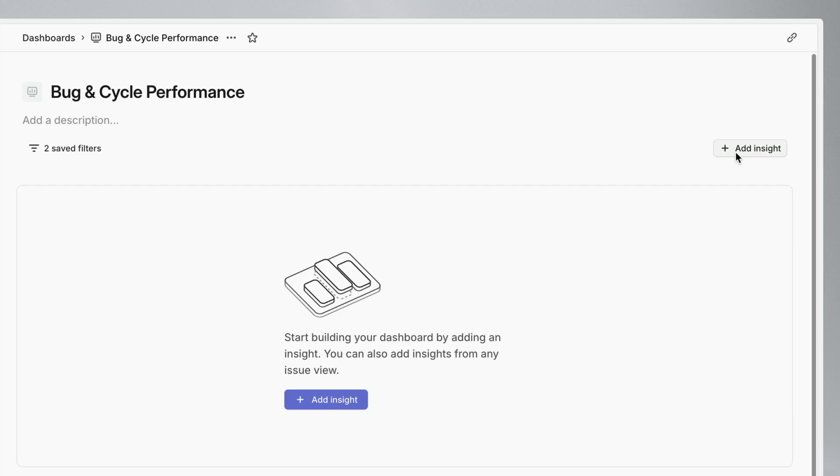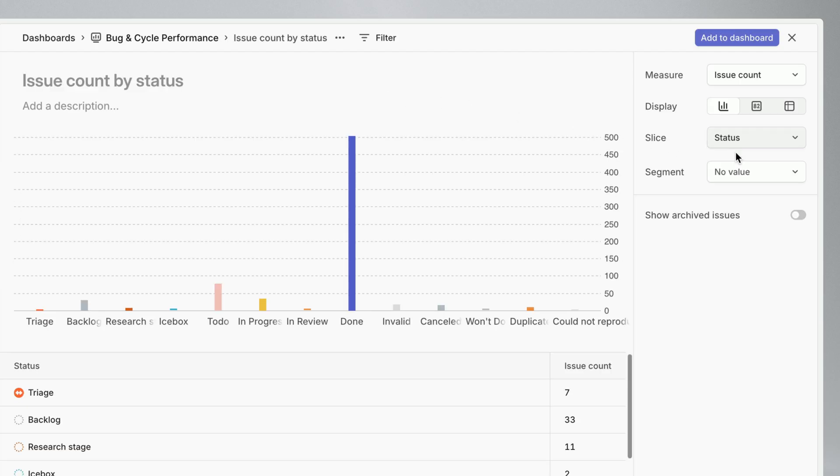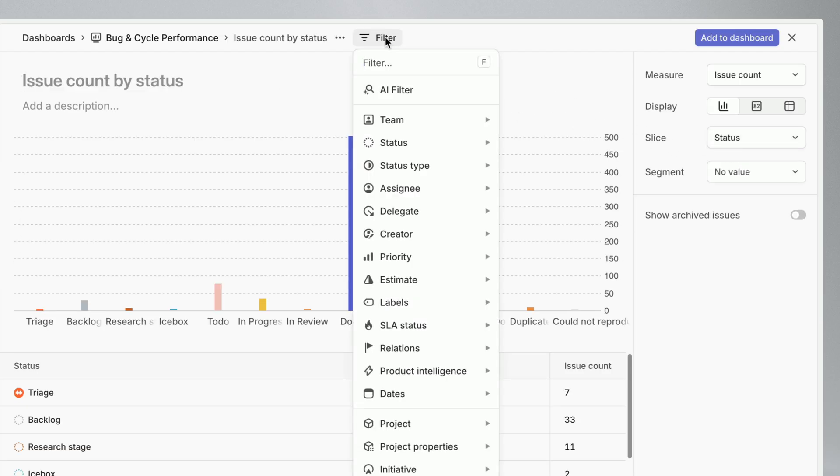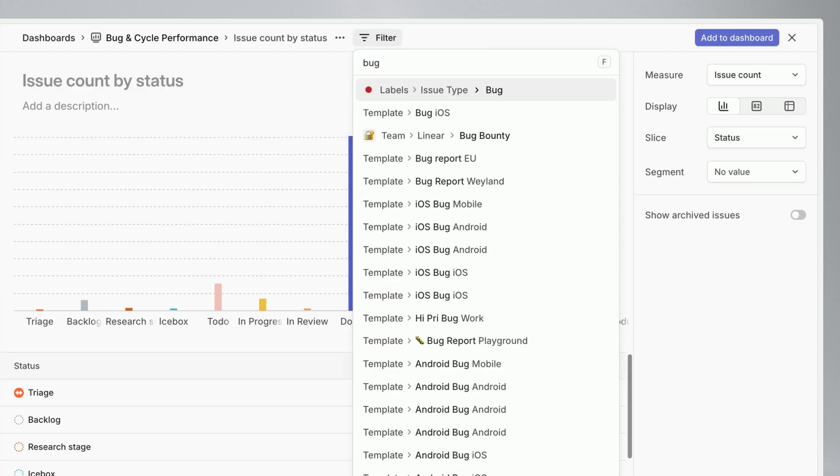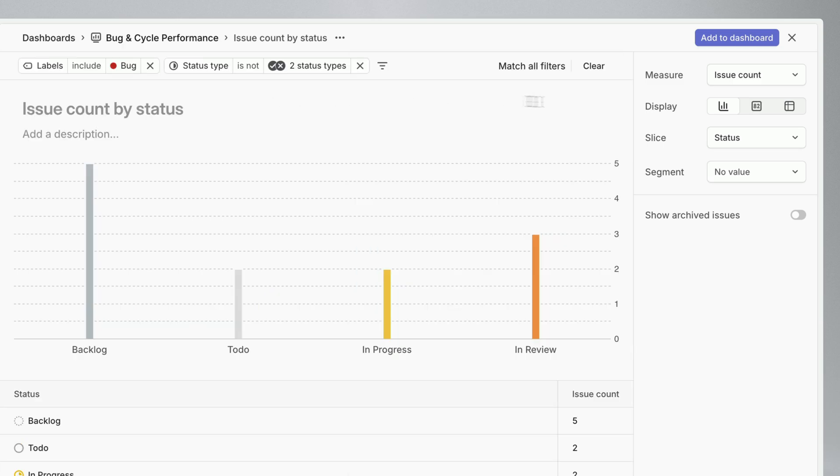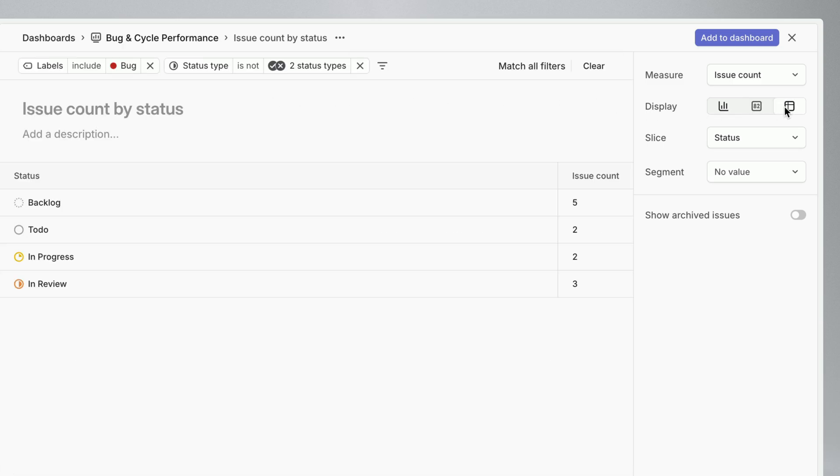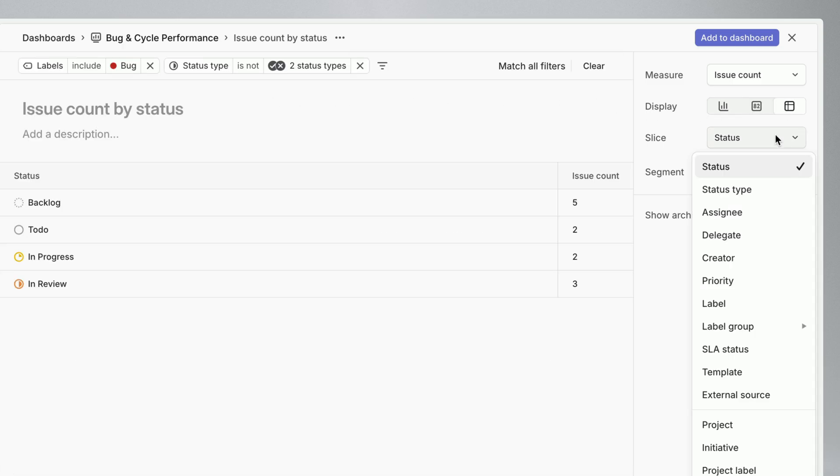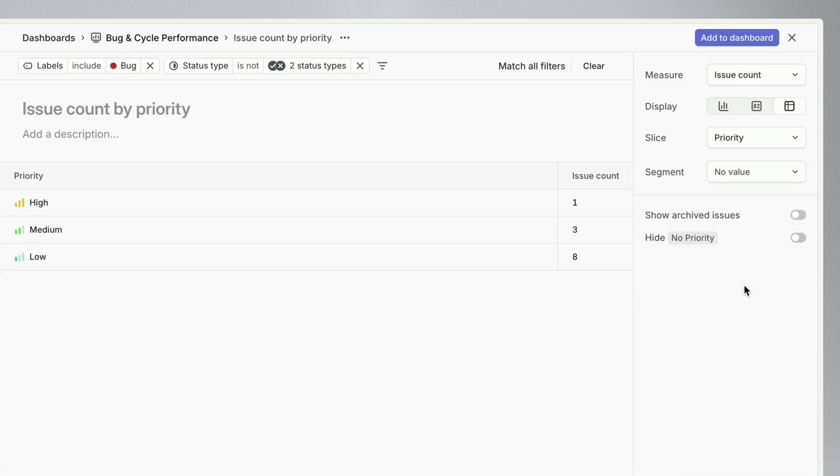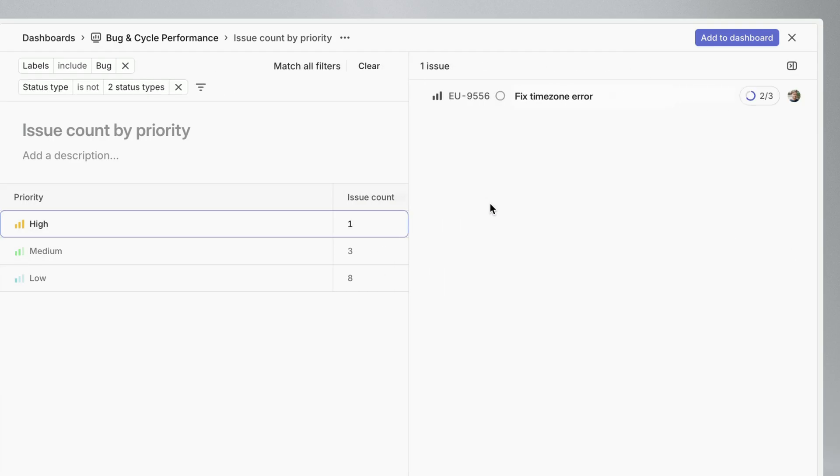First I'll start with the big picture, creating a table to get a count of all open bugs. To make this more actionable I'll slice it by priority, and now I can double click on high priority open bugs and see a list of exactly what those issues are and who is working on them.